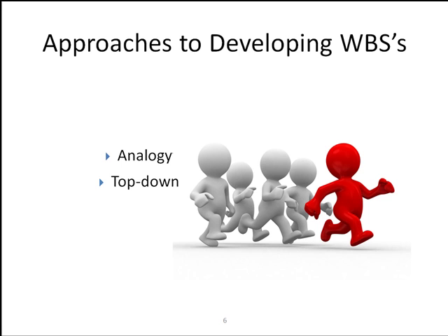The top-down approach, the one that we're going to use, here's where you start with the largest items of the project, break them down, and this is how it was used in the previous examples. You break them down into successive smaller and smaller pieces of work until you finally get to the task that you can describe in detail.